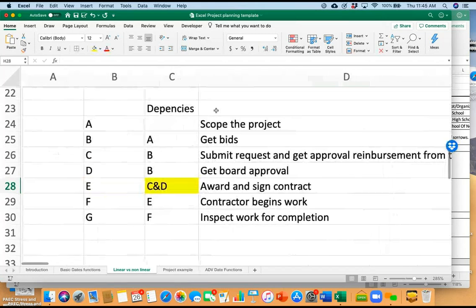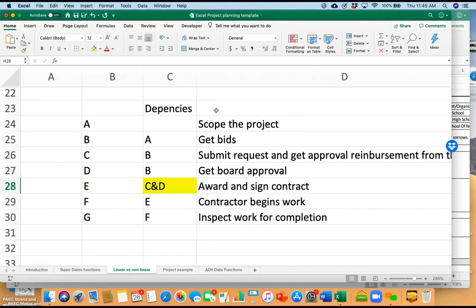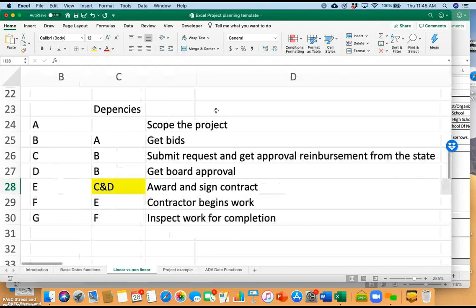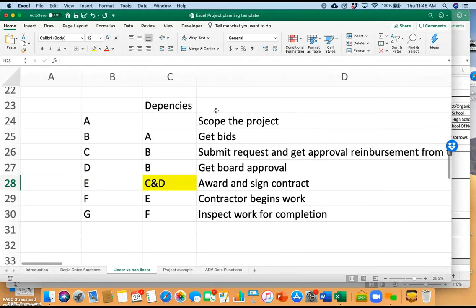And the key is actually this. You have to start by getting this down. Once you get this down, doing this is fine. If you don't first understand the dependencies, you're going to go out of your mind, okay? So absolutely, first step I always do in a project is label everything, then I figure out what's dependent on what, and then I just make sure I didn't make any errors. Okay? All right? You with me so far?